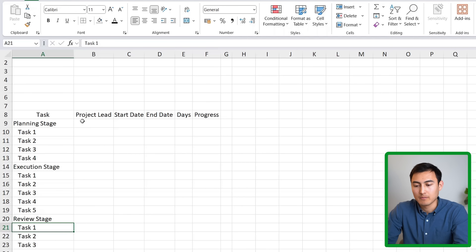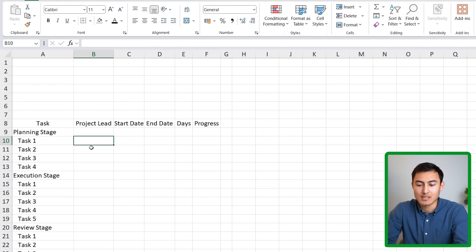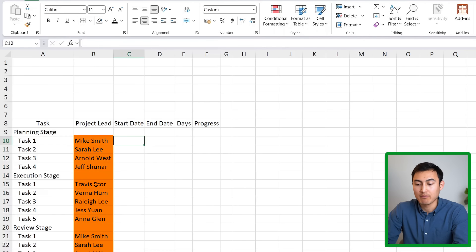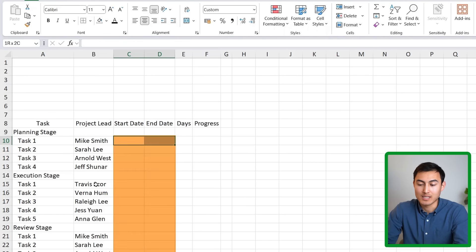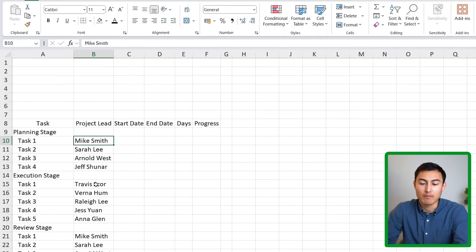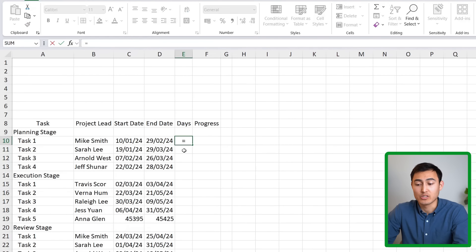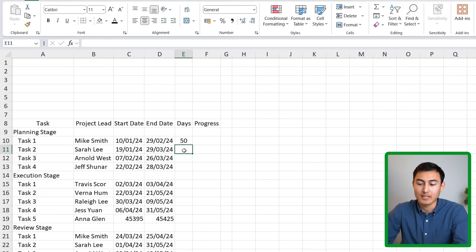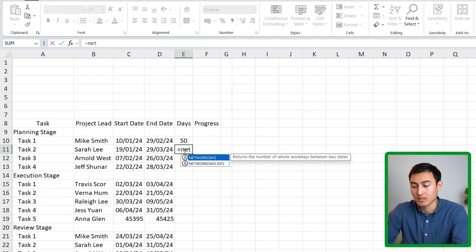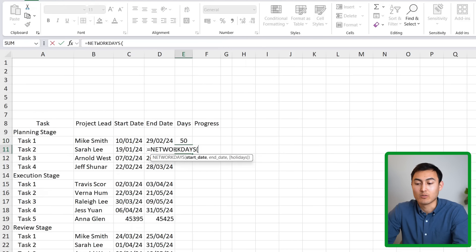Next, we add all of the project leads — the people in charge of each task. Then we add start and end dates as rough estimates for task start and completion. For the days column, the simple approach is just end date minus start date, but if you don't want to count weekends you can use the NETWORKDAYS formula, which only accounts for workdays.